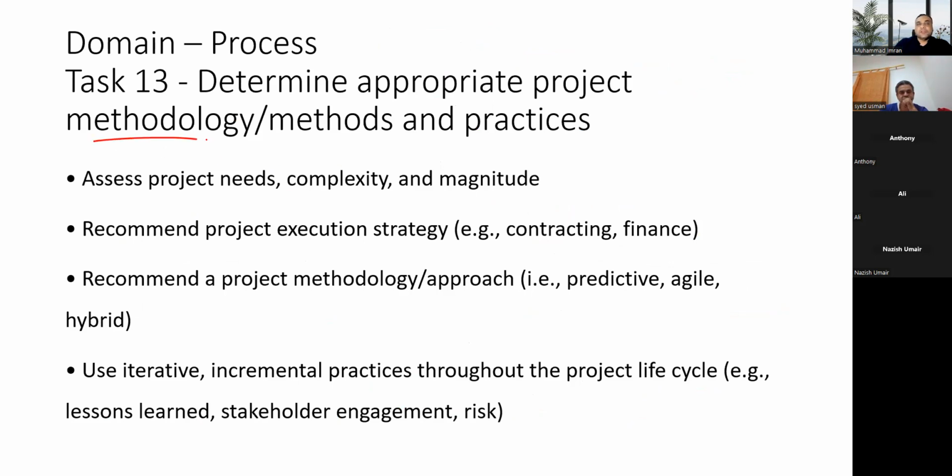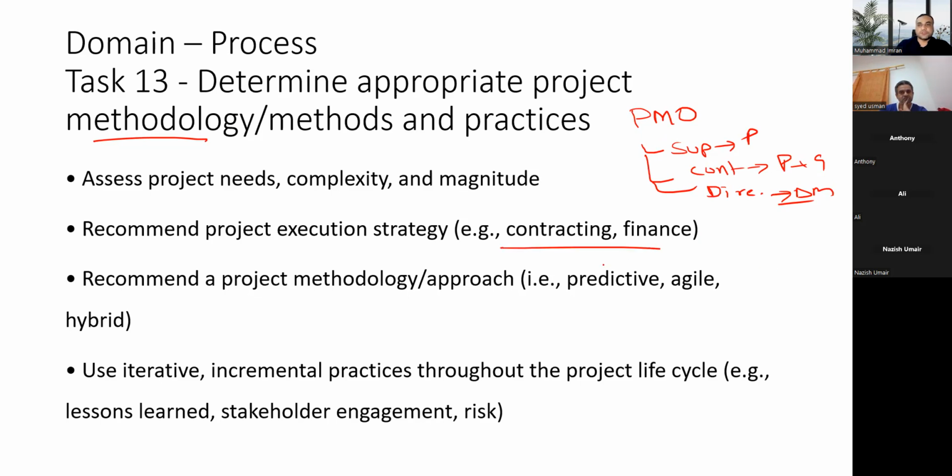You have to find out the proper methodology. If you don't have knowledge, or if you don't have the control, you can look at the PMO. PMO will guide you in terms of three roles, right? Supportive, which means they will provide you; controlling, which means they will provide and guide you; and the last one, directive, where decision making will be done by PMO. So you can take their advice on which type of project methodology should be used. What will be the contracting terms? Do you have to pay 15% advance, or go 100% advance, or how those terms will be applicable.